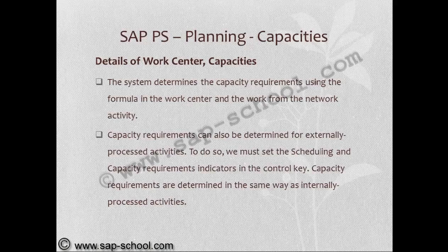Capacity requirement can also be determined for externally processed activities. To do so, we must set the scheduling and capacity requirements indicator in the control key. Capacity requirements are determined in the same way as internally processed activities.